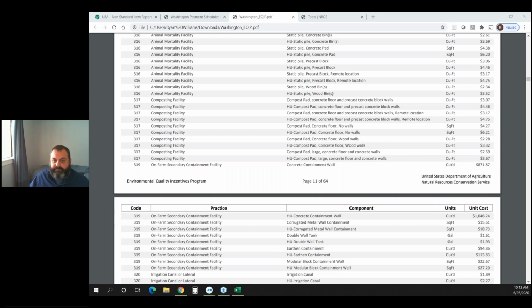And I will say something that we've done down at Pierce Conservation District is just keep a running tally of the projects that we've done in the past and use that to average out expected costs for projects coming up, either on a square foot basis or some other unit, recognizing that the farther back you go, the less useful those numbers are going to be.